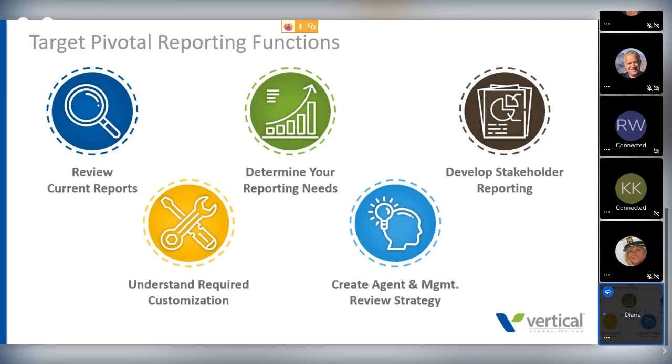And then lastly, don't think of reporting only as that operational and contact center tactical reporting. What do your other stakeholders need? Your touch point owners, what do they need to see? What does senior management need to see? All of these key areas will feed into what your reporting requirements are and should be discussed during the implementation as part of the design.